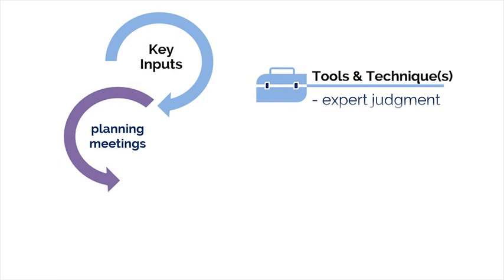Some of the key tools and techniques for the Plan Cost Management process include expert judgment, which provides valuable insight about the environment of the project and how we can look at and manage costs. Analytical techniques such as NPV, IRR, ROI, and payback period are often useful on projects, such as in the case where we want to know how long it will take to recover our money should we invest in a project. The payback period will tell us a specific time period in which we will recover our initial investment, and we can use this information to decide whether we should accept or reject the project based on the criteria of when we need to be paid back.